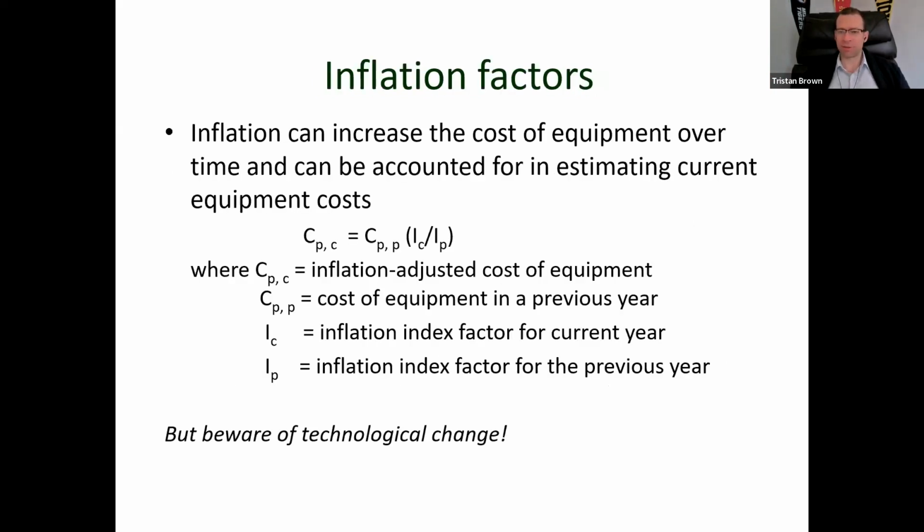We also have to account for inflation factors. This is especially true when we start talking about types of projects based on technology that has been around for, say, 10 or 20 years, it just hasn't been deployed yet. Everyone knows what inflation is nowadays because we're experiencing high inflation for the first time in close to 40 years. But there's always a little bit of inflation. Even when we were at 2 to 3% inflation every single year, that would add up over time, right? 10 years, 20 years, that would start to result in very different numbers.